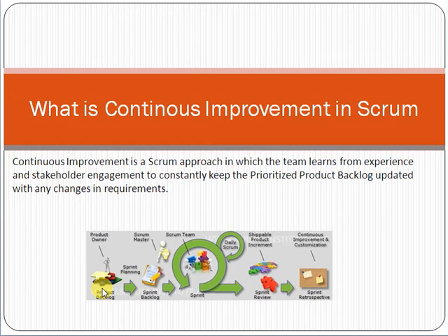In the daily stand-up meeting, we discuss what we have done yesterday, what we are planning to do next, and what issues we are facing. So from each other we are learning. Again, it is an improving process in which we are talking with each other. The problems which we are facing, we are sharing with each other. If anyone has some clue, if he can give some guidance, if he can share some knowledge, we can learn from him as well.